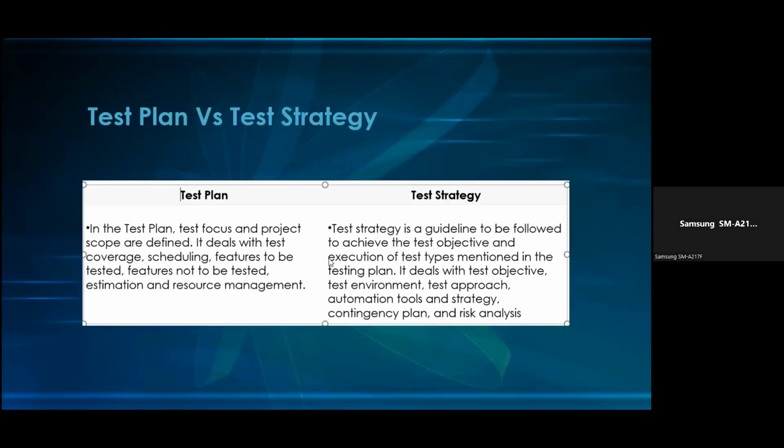Just to say test plan versus test strategy. In a test plan document, test focus and project scope are defined. It deals with the test coverage, scheduling, features to be tested, features not to be tested, estimation, and resource management.